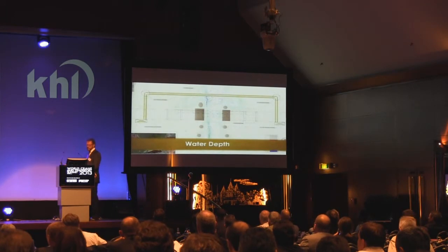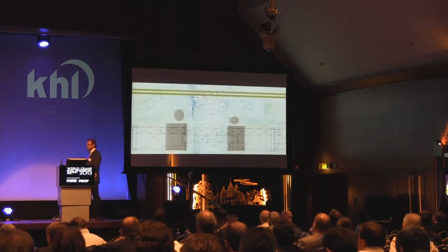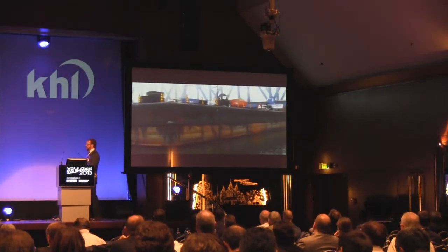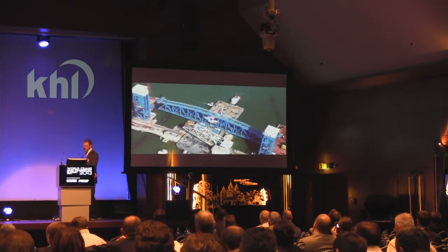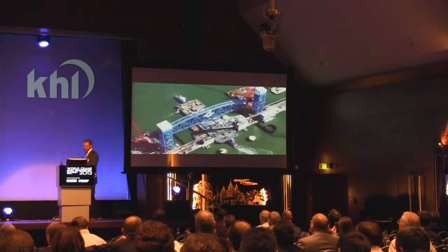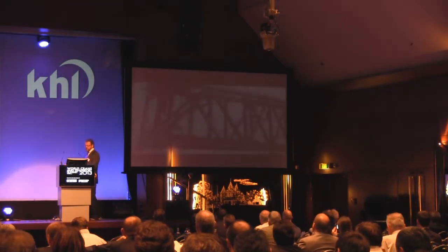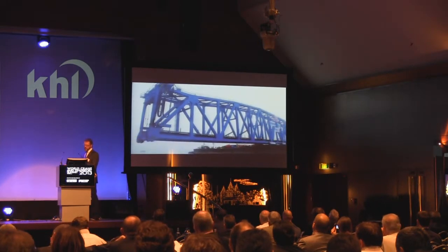Gas lines run directly underneath the channel, as do the water lines that supply all of Galveston with water. The barge could not be too deep, or we would hit the lines, not only causing damage to the gas and water lines themselves, but posing safety hazards, environmental threats, and the potential to knock out all of Galveston's water supply. The colossal bridge was 287 feet wider than the barge.